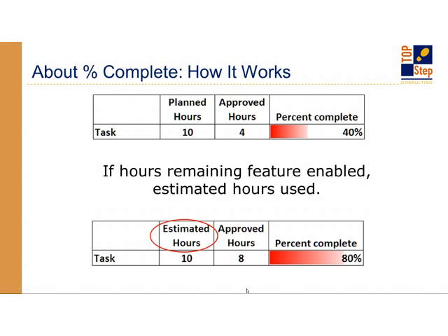It will use estimated. For those of you not using estimated, the concept is like this. So let's say there was initially a 10-hour task. Somebody works 5 hours and they realize, you know what, I've got another 10 left. They would enter their 5 hours on their timesheet, and they would say, now I've still got 10 hours left. Then the estimated would be the 5 that they've worked plus the 10 that they've said are remaining. And in that example, estimated would be 15. So it's more of a fluid number that is updated by users entering that number in their timesheet. And it can also be overridden by project managers on the task itself.